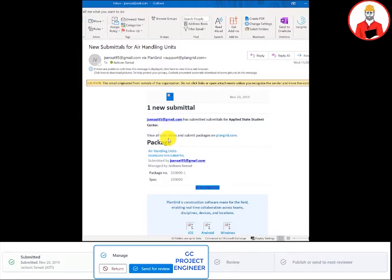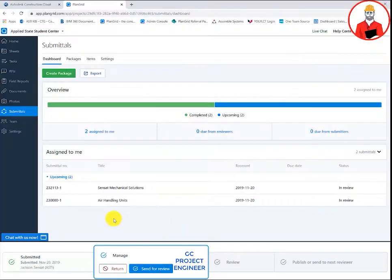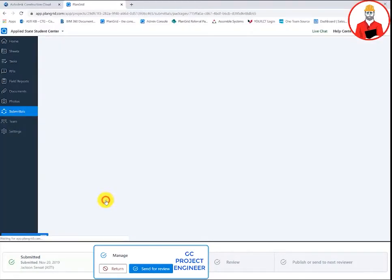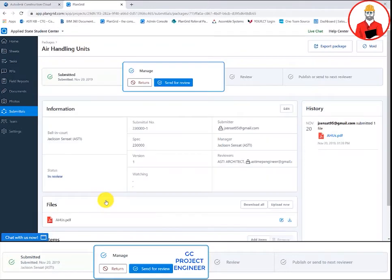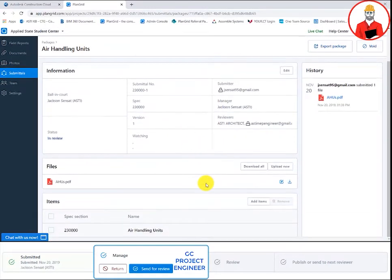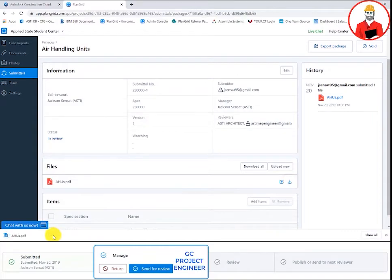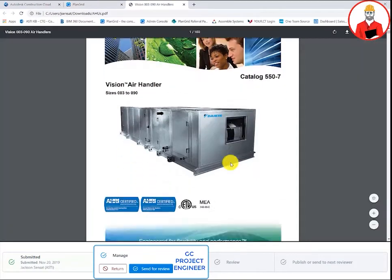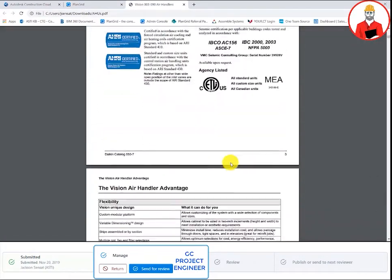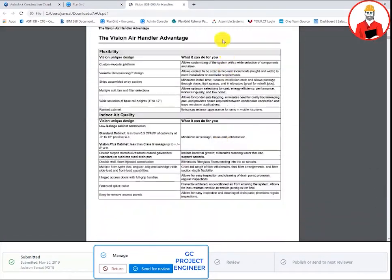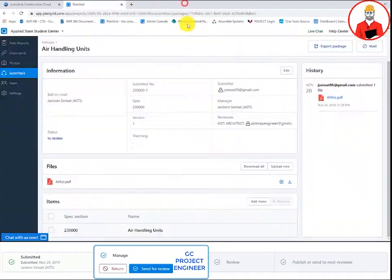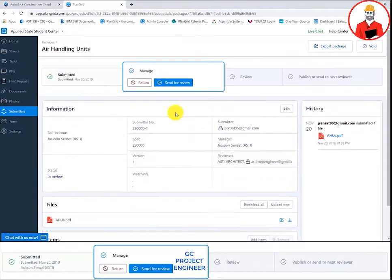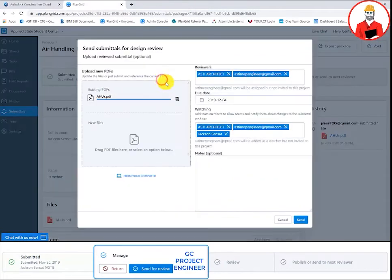When the submitter submits their attachment, the RFI manager will receive an automatic email prompting them to review that attachment and then send on for review. This looks good. I'll go ahead and send this over to the mechanical engineer and we'll copy the architectural firm just to keep them in the loop.